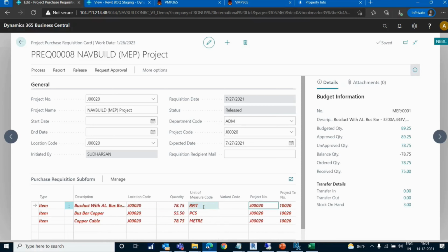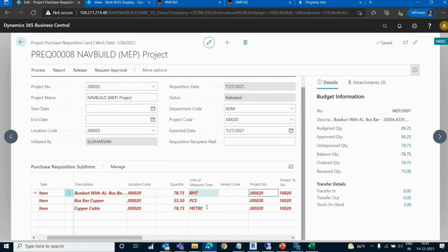So there will not be any manual entering or manual requirement raised by the project team in the system. In case you are going to allow the requisition even for more than the budget, the system is going to highlight it in red throughout your purchase flow, when you receive a material, until it has been used.